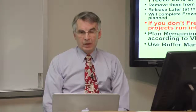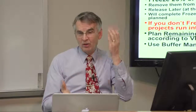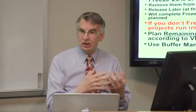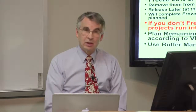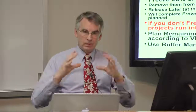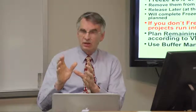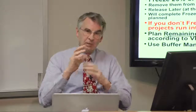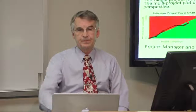So it's really good to see which ones. If you've got some that are too far in the red and in the black, those are good candidates for freezing. Or maybe they're just low priority work and they shouldn't have been done in the first place. So you start off with about 75% of your remaining work to get things going, and then you use buffer management to slide resources back between those people who need it the most.